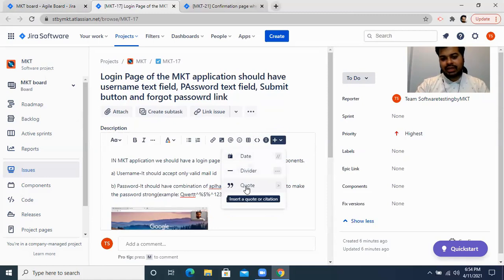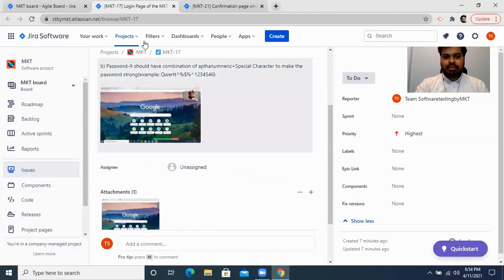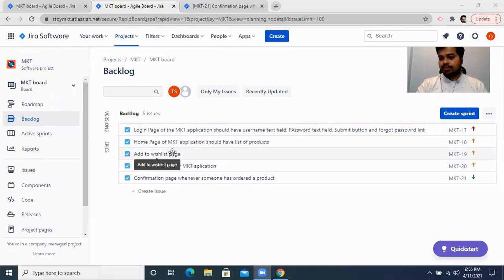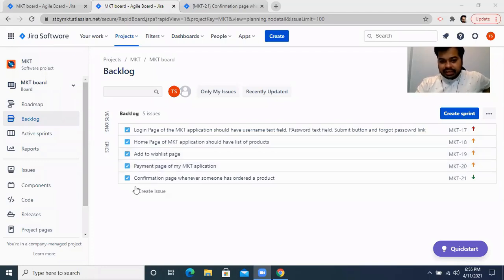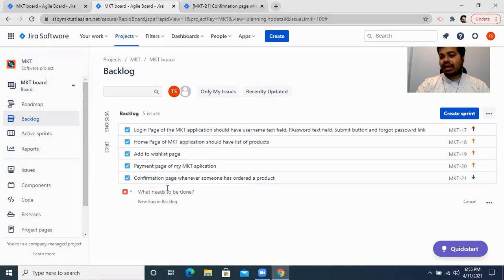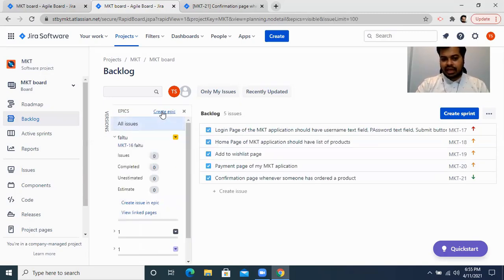Once you have done that, your product backlog is ready. If you click on the product backlog, you can see all your backlog items. If more tasks are coming — that my developer and tester should work on — I can just create them here and add them to the product backlog. It also has the option of creating a bug. If there is an existing bug in production, being the product manager you can create a bug and keep it in the backlog, meaning tomorrow your developer and tester should work on it.